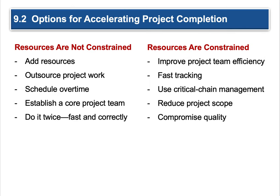There are options for accelerating your project completion. Basically, you can put more fuel on the fire. You can add resources — put fewer constraints on your resources. Or you could outsource some of the project work. You could schedule overtime, give people more time to work on it. Establish a core project team — break people off other responsibilities and have them just on this project. Or do it twice: fast and correctly.